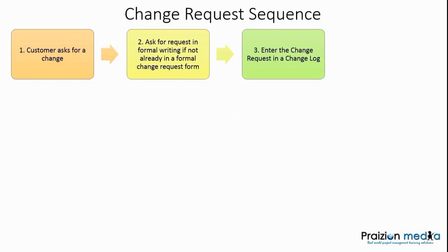The next step is to enter that change request into the change log, even before you begin to work on it. Get a change request and enter it into the change log. Record the information that you have so far about the change request.